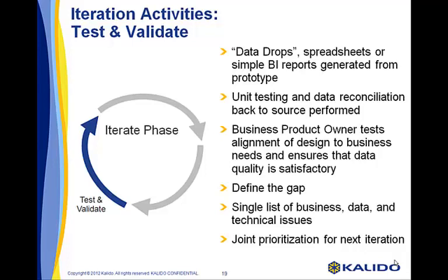During this session, there should be a single list of business and technical issues that are jointly managed by both the business and technical roles. Having the business users this involved in the process is the only way to take the approach of actively managing scope. Finding out that there is lots of low-quality data, so we are going to remove one of the business questions from the current project to cater for an additional quality process, is a joint decision and is transparent across the team. Once these decisions have been made, we go through the full cycle again. Each iteration takes us closer to a design that fits the real requirements.